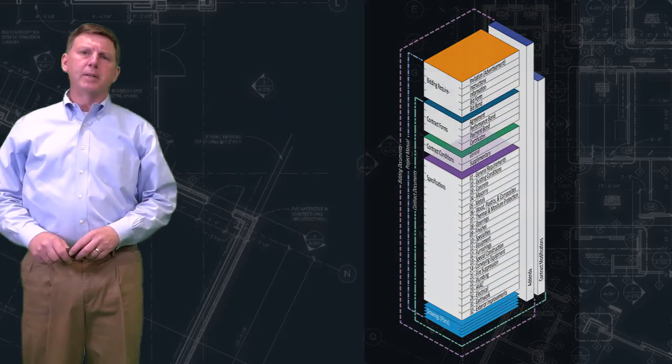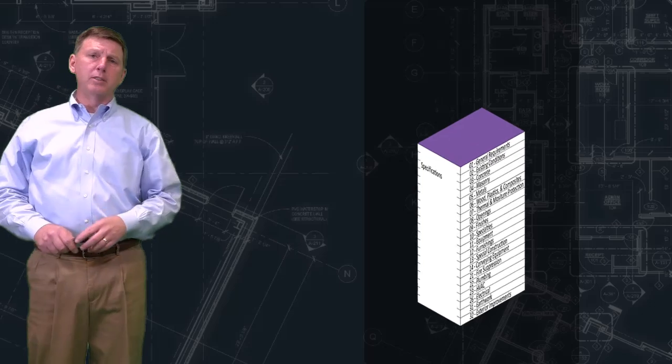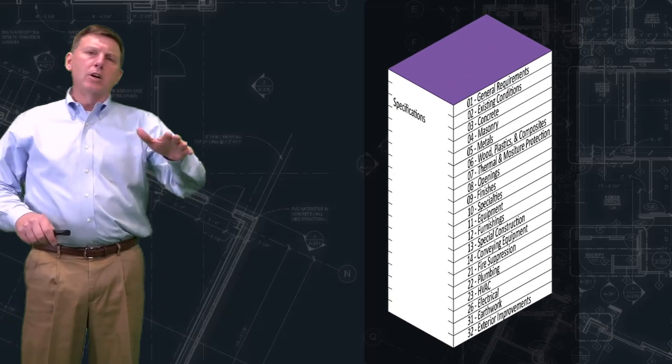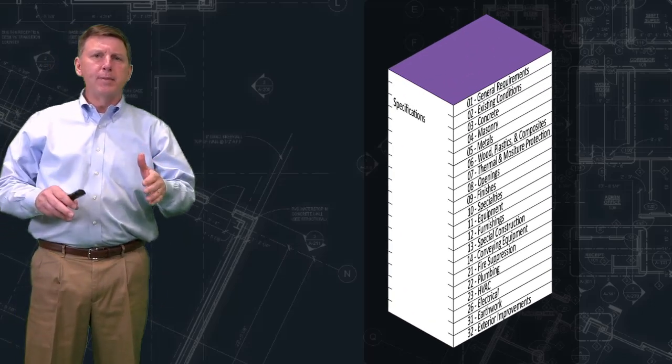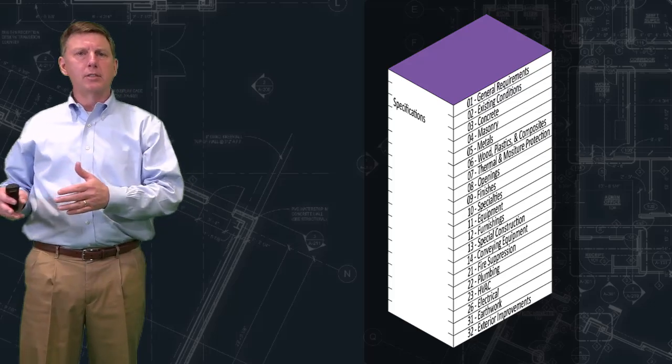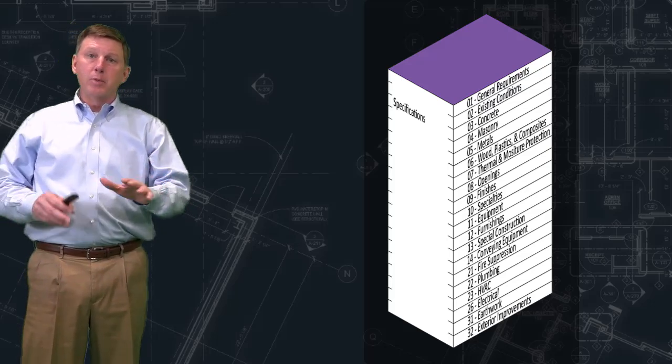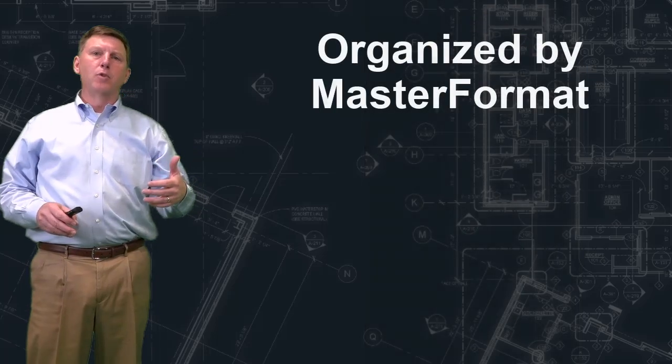All right, let's talk about the specifications. You'll be dealing with these quite often. Specifications are the written information that complements the drawings. And the specifications for most projects are going to be organized by master format.